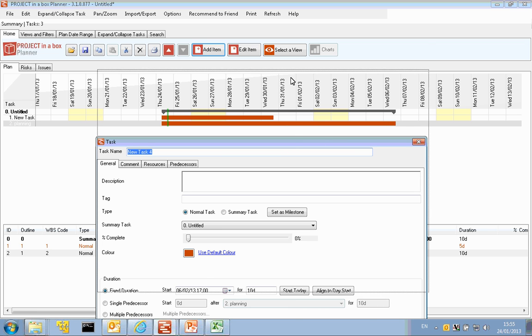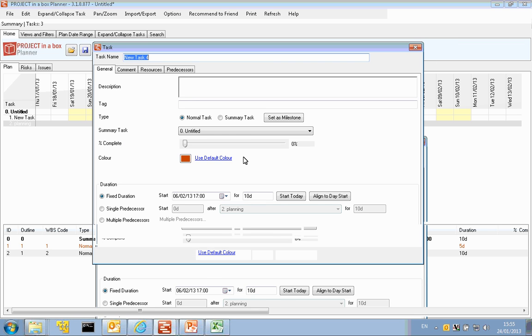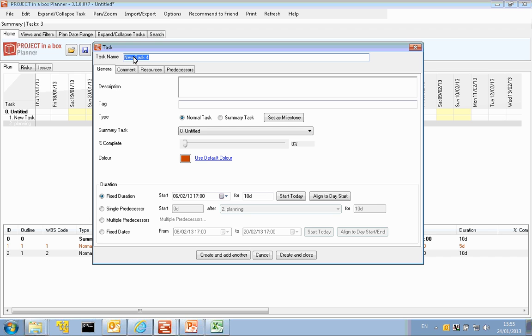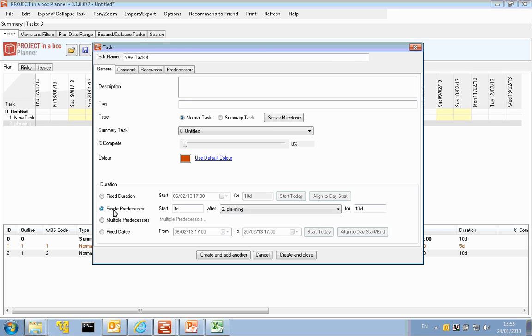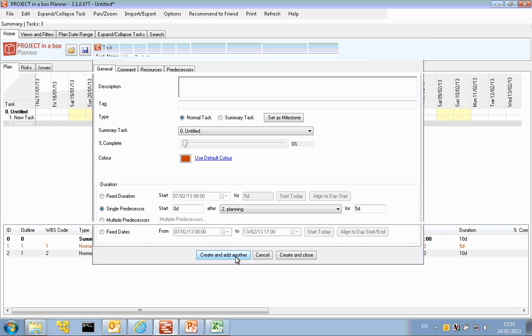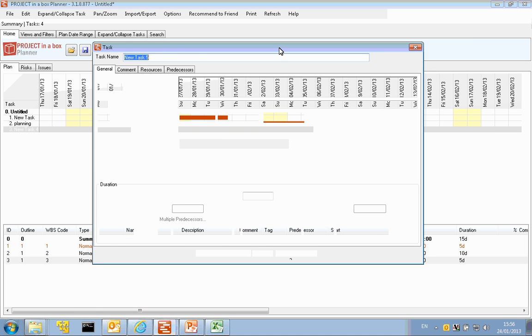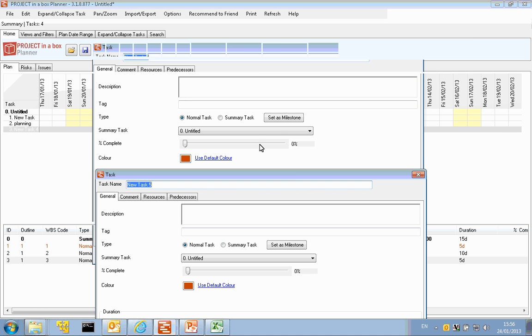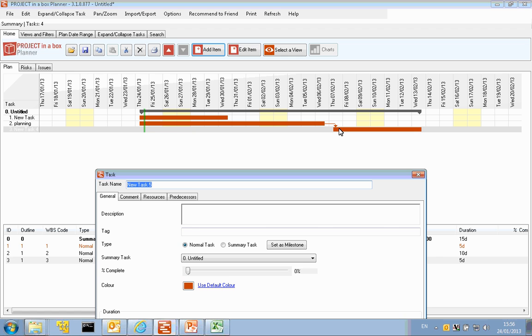And I'm going to add my next task now. I'm not going to bother keep changing these task names, I'll just leave it to the automatic one, so we've got new task 4. This is going to be a normal task as well, and this is going to come in perhaps after the preceding task. So rather than picking a fixed duration, I'm going to go for a single predecessor. So I want my task to finish after the preceding task, and it automatically prompts me with that. I can make that task a certain duration, so I'm going to make it 5 days. And I could also choose to have it have a lag so it doesn't start immediately after, it leaves a gap before it chooses to start. But we'll leave that as 0 for the time being. So create and add another. We'll see behind the scenes now that that's showing the task starting after the preceding one.